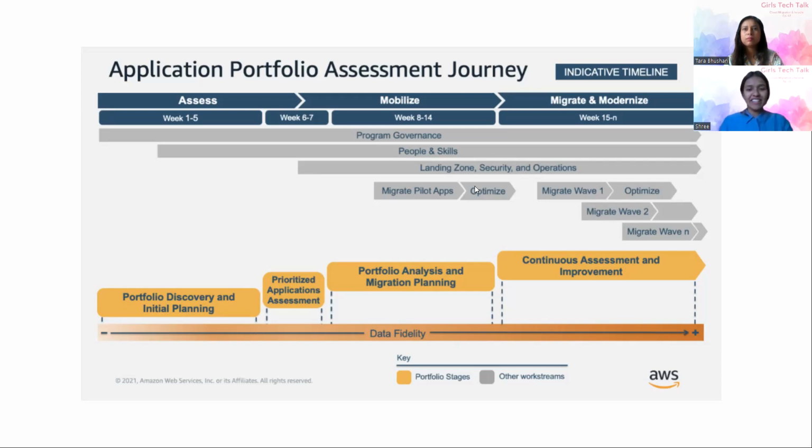Are there any insights on this slide? Yeah, as I said earlier, usually we try to do the migration in small chunks. We don't take the full application and spend 2 or 3 years on migration. Practically, that doesn't work that way. Usually we break it product area wise, functionality wise, so that we can work in an agile fashion. We try to break it into 3 months, 4 months, 6 months, at max 8 months projects, and then try to migrate it.